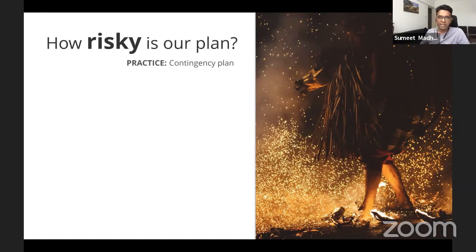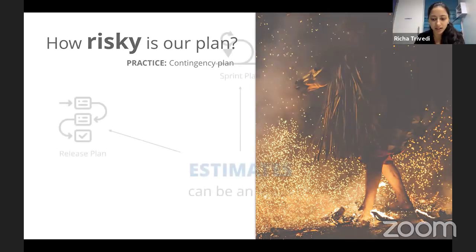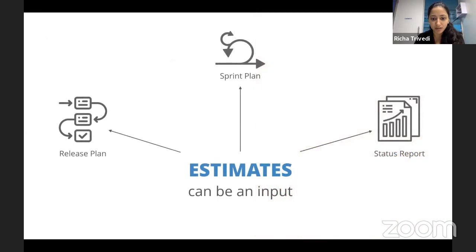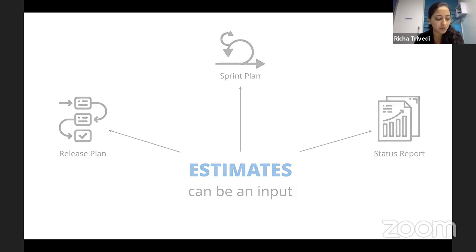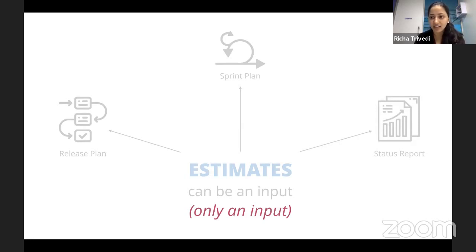Estimates can be an input to the release plan, the sprint plan, and the status report, which basically means that if you're creating a rough plan, you need to know roughly how big it is. But estimates are not equivalent to time — they're just one of the inputs. We will see how they can be an input to all of these in our subsequent videos.